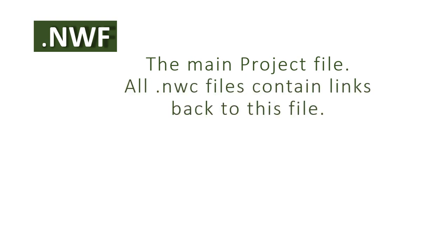The second type of file is called the NWF. This is considered the project file and it's a file that you will open each time when you want to perform analysis, 4D scheduling, animations, etc. No actual model geometry is saved with this file, but it does contain Navisworks information, such as review markups, saved viewpoints and materials. This file will actually contain live links to the contributing NWC files.